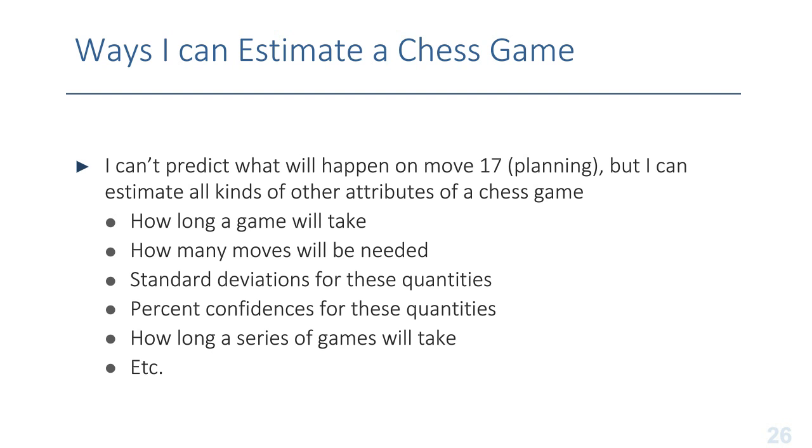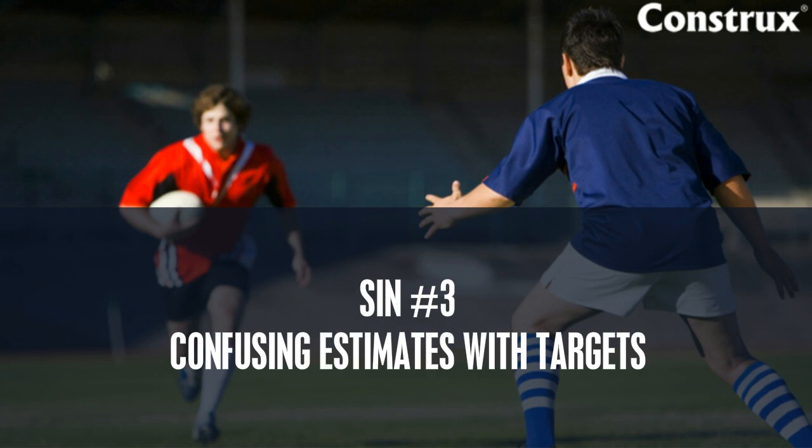And that implies use of some different estimation practices for, say, sprint planning, which is really internal to the team in Scrum, versus release planning, which is going to be a combination of internal teamwork but also externally visible to business stakeholders in the organization.